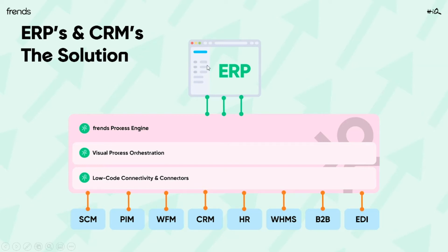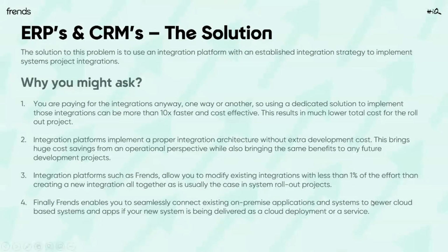But we can, of course, now use that to reduce the work effort of actually implementing the ERP itself. So this actually means that you're moving some of the work away from the ERP implementation project and putting that into use in implementing the integration platform, because basically you are paying for those integrations anyway, one way or another.